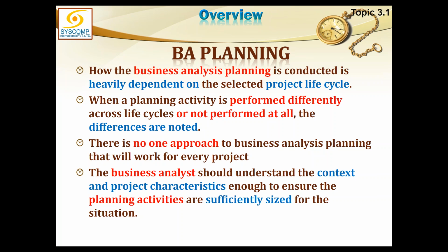So what if I say that these are all the pre-construction activities which you have grouped together into a phase? Acquisition of land, feasibilities, designs and architecture, maybe permission from the government departments and utilities, so coordinating with them, maybe clearing of the land and all those things. This could be the first process. And what is the result of the process? What will be the deliverable of this process?